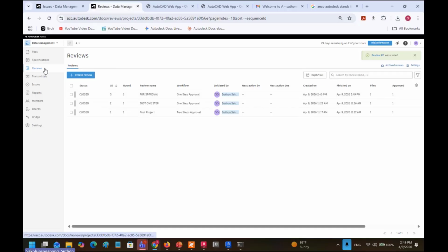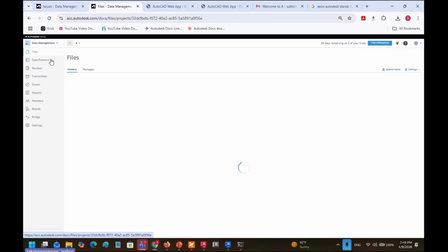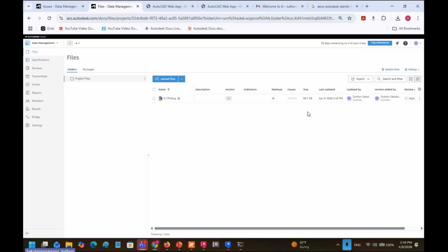And then when we go to the review, the case is closed. So when I go to the files, I can see the status of the files, the issue, the version. You can see that the review status is approved. That means we have a rule for our team that usually the approved file is used to work further. Do not use a file in any status except approved. So if the file shows approved status, that means they can use it to work continuously, right?